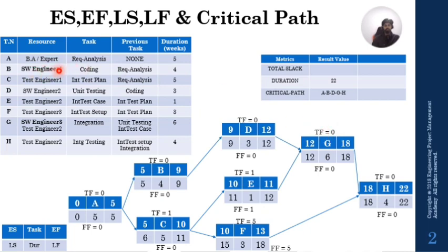So you go to engineer 1, speak to him, give him a briefing, come to an agreement, and assure that he continues this activity until the actual resource, software engineer 3, is available back to continue activity G, so that you don't put the project at risk.